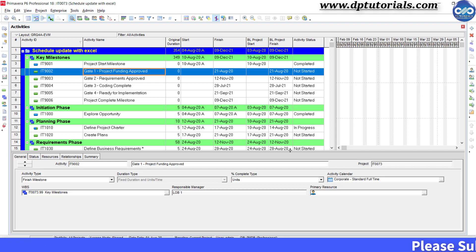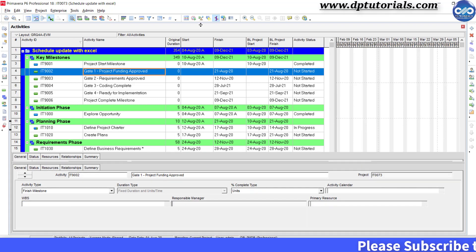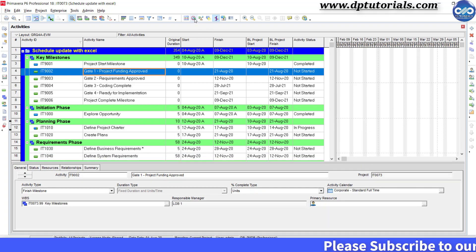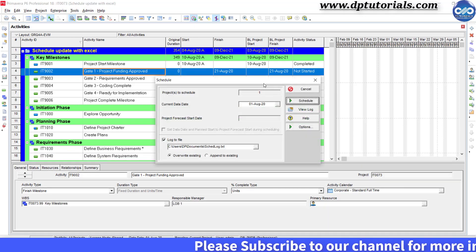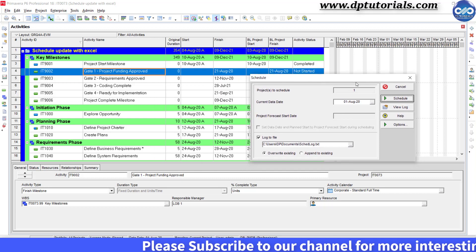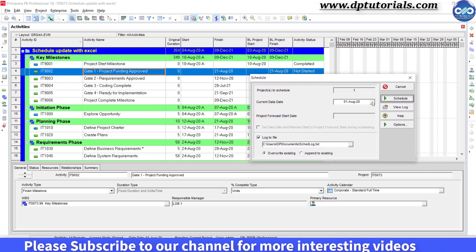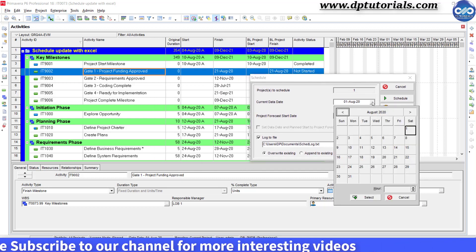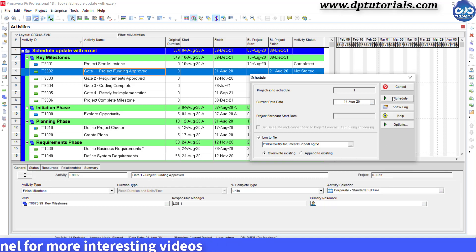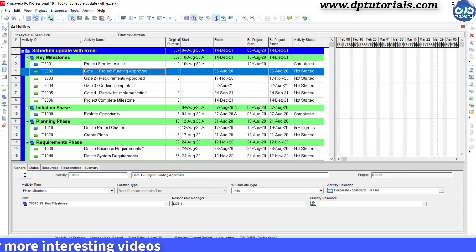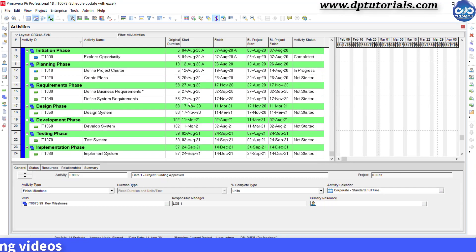To complete this update process, you need to now schedule the project with a new data date so that your entire schedule gets recalculated. So now this is your final schedule.